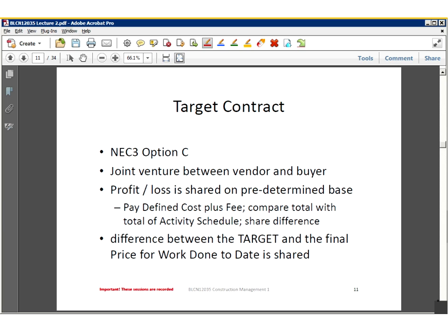They set up share contribution ranges at the beginning of a contract to say that if the contract comes in at 80% of the quote, the contractor is going to get 15% of the saving. If it comes in at, let's say, 80 to 90% of the contract value, he is going to get 10%. If it comes in between 95 to 105, he gets 5%. All right, so how it works is, yep, basically a cost plus reimbursement type contract.